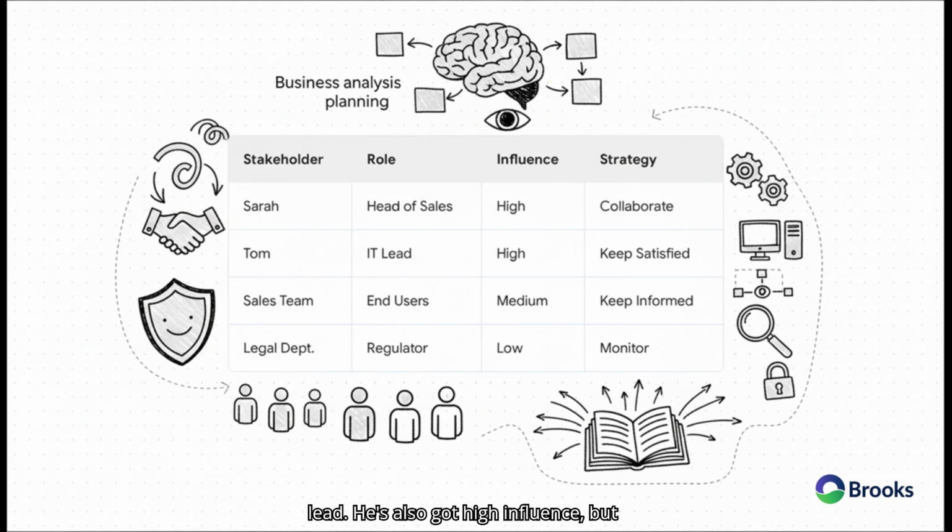Then there's Tom, the IT lead. He's also got high influence, but he might not be in the weeds every day. So the goal there is to keep him satisfied. The sales team, they're the ones who will actually use this thing. So they need to be kept informed.